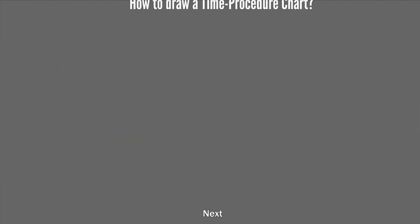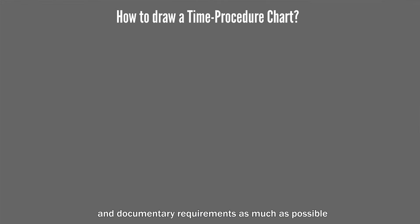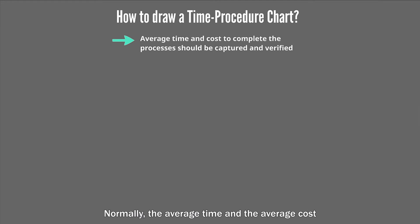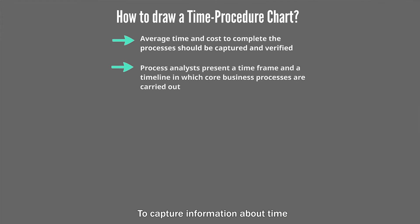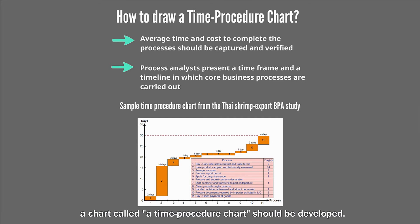Next, drawing a time procedure chart: process analysts should collect quantitative data about business processes and documentary requirements — especially those related to the time and cost incurred in each business process. Normally, the average time and the average cost it takes to complete the process should be captured and verified. To capture information about time needed, a chart called a time procedure chart should be developed.